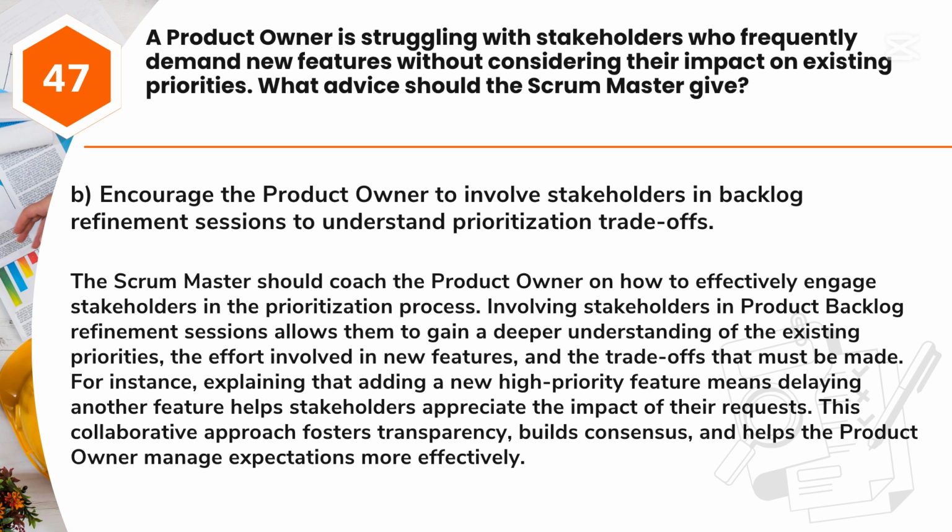For instance, explaining that adding a new high-priority feature means delaying another feature helps stakeholders appreciate the impact of their requests. This collaborative approach fosters transparency, builds consensus, and helps the product owner manage expectations more effectively.